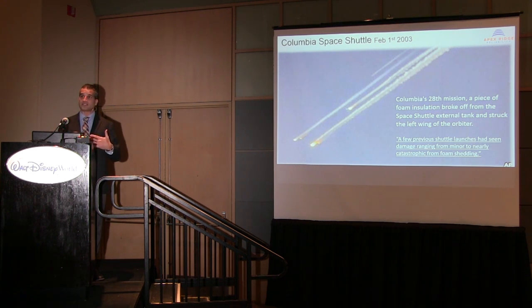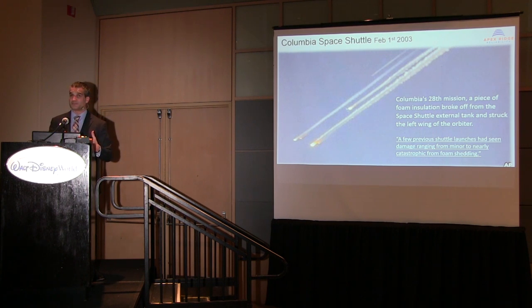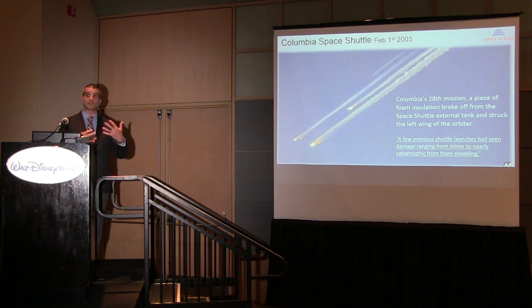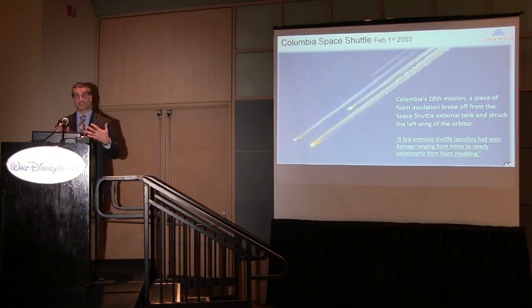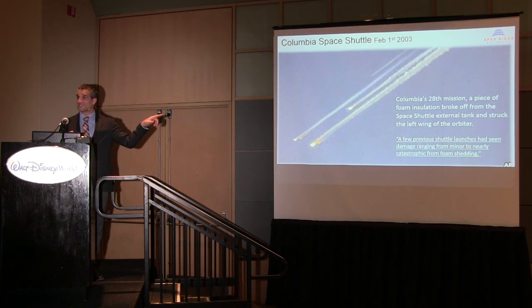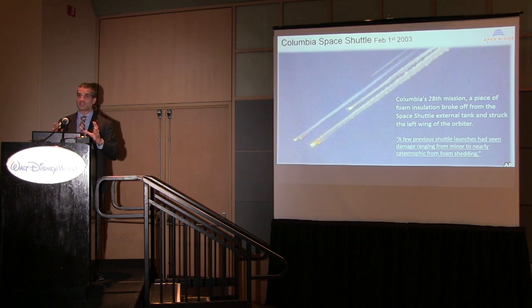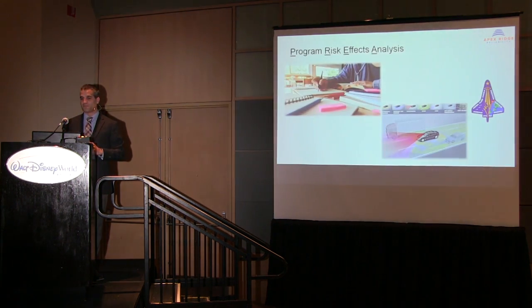There's a couple things. One, you're continuing to discuss it by going back and revisiting it the way you do with a DFMEA. And the other is you might adjust your scoring based on events that happened, such as, hey, when it came back last time, those tiles were missing and we saw burn marks. That changes the scoring on one of the tables. So this tool, in addition to helping within the program, also helps ensure that these topics and these risks stay quantitative and stay within the decision-making process.